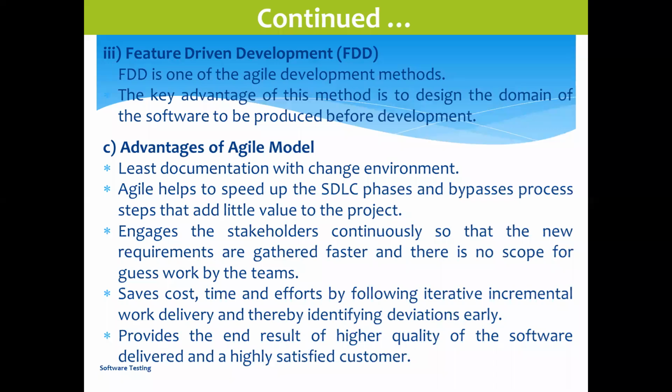If some network issue is there, that is not from your side but from the company organization side, that can be a valid reason. Or development was not completed in their timeline and suddenly it came to testing. You have the plan for 15 days, but a 10-day delay happened from the development side and you have only 5 days. That is a valid reason. You can challenge: we have 5 days, how can we complete? So you can give some valid reason here.